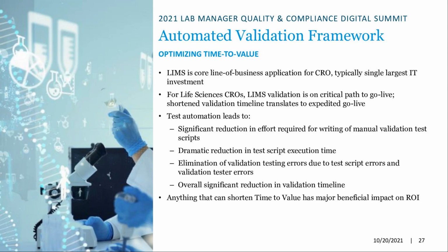What normally took 6 to 9 months just to get your test and validation environments and your production environments up and running, you can do in a fraction of the time. Validation testing has historically been more on the back end, but it's always on the critical path to go live for systems.